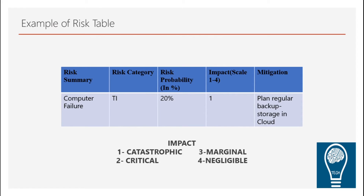Here is a simple example: a computer failure falls into the technical issues category with a probability of 20% in a gaming environment. The impact is very high — considered catastrophic. You can see the impact levels in the table below. The mitigation plan includes regular backups and cloud storage. This is how you create a risk table.